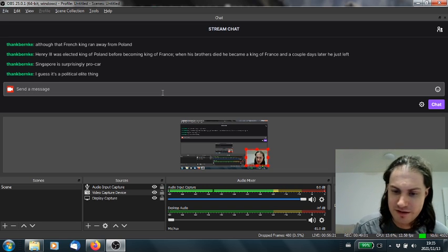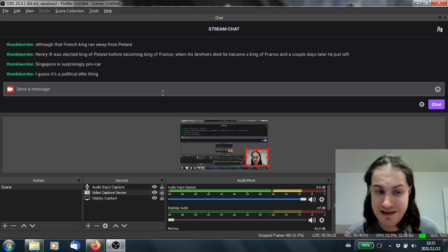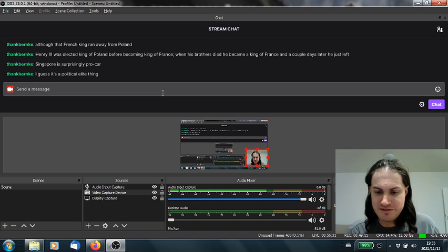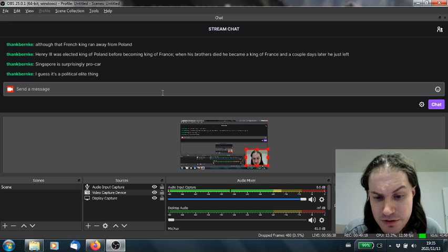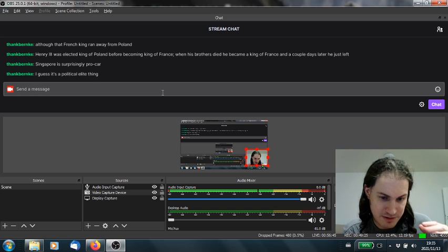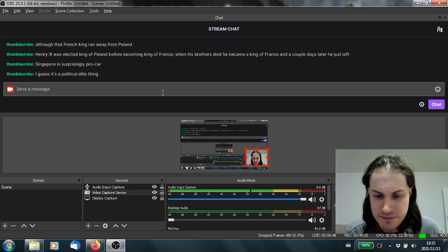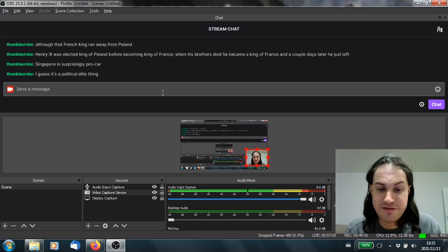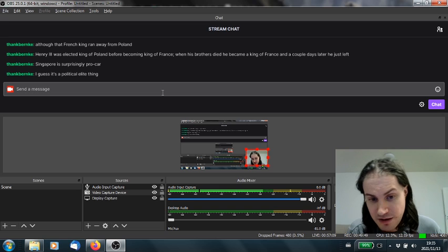I can't tell if even that has its limits, or maybe they haven't heard of this because they learned how to do everything deep underground and with very big cavernous stations. Even if they're cut and covered, they try not to build them in the middle of a road in Singapore. Whereas in Sweden, for example, they also do deep mining, but when they build cut and cover stations, not in Stockholm because the rock's not good for that, but in Gothenburg, as a political transit first thing, they will open up the lanes of car traffic for station construction, and they will keep the sidewalks. So the sidewalks will remain functional for pedestrians and cyclists.